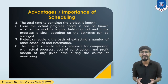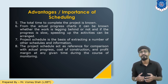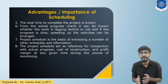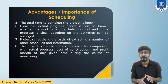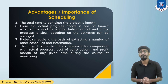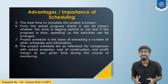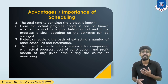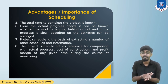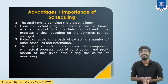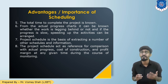Apart from that, the basic point is that scheduling gives us the total time for project completion. From the actual progress of the work we can determine whether we are lagging behind the schedule and, if so, how we can speed up activities to match the actual schedule. The project schedule also serves as the basis for preparing other schedules and extracting other information. It works as a baseline — a base schedule against which you can measure the actual progress of the work in terms of time, cost, etc.